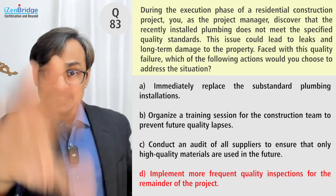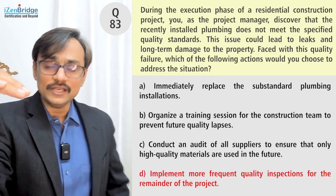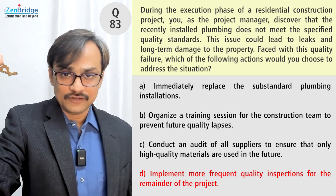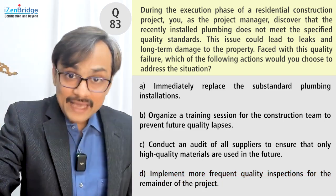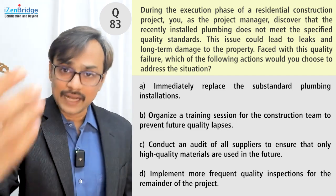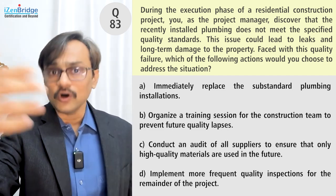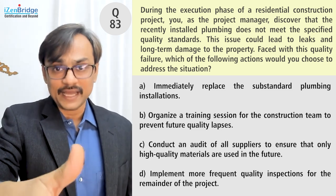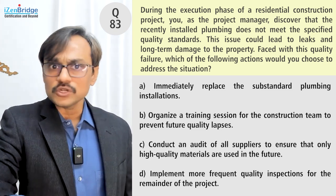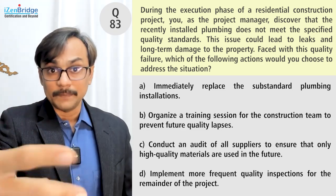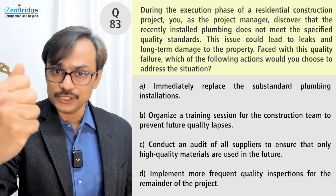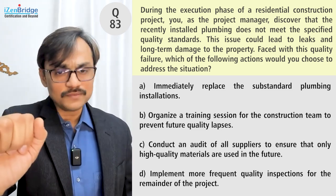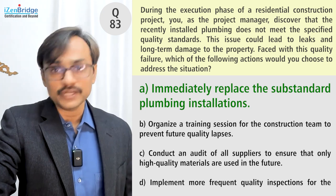The logic is simple: Options B, C, and D all point to prevention, while Option A focuses on correcting the problem first. If there had been an option to recognize the issue, analyze it, log it, and then act on it, I might have chosen that. But since Option A directly jumps to corrective action, it is the best choice compared to the other three — I need to correct the thing first before doing future prevention and problem-solving. So Option A wins.